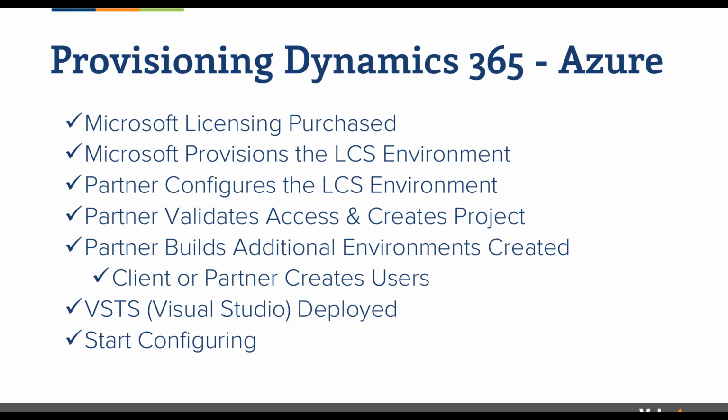We will deploy a Visual Studio, and then we're finally ready to start configuring. So once you've made the decision and the purchase to move to Dynamics 365, it takes a few weeks to get the ball rolling with these steps before we can actually jump into the configuration project.